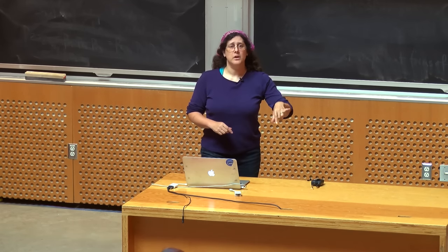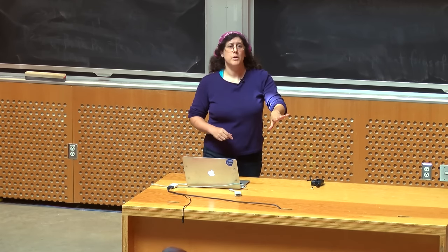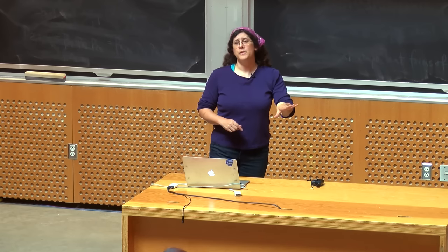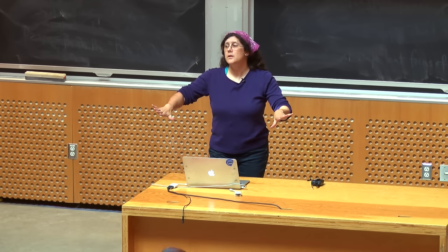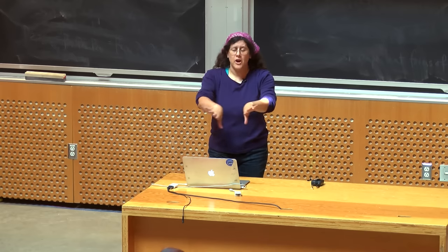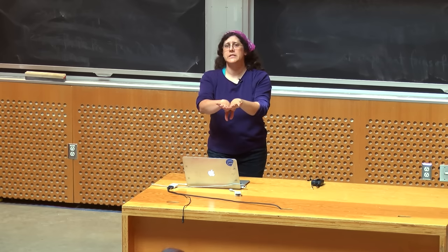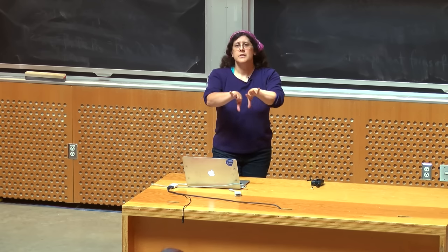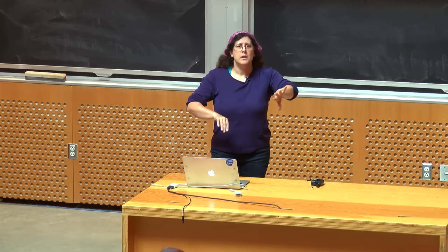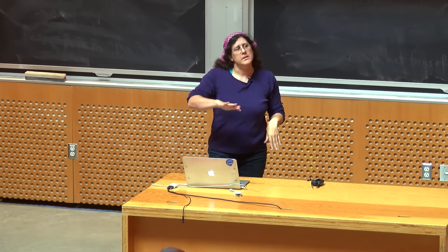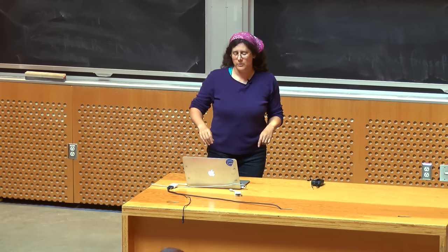Just trying to keep the backlog straight, keeping meetings flowing, and keeping communication flowing is a lot of work for one person. You don't also want to burden that person with being in charge of leading the team and making all the final decisions. If you can find a way to try, they often end up drifting together, and we see it a lot, and we often make the slip of calling the person who's serving as the team Scrum Master the producer. See if you can try to keep those two roles separate. If you can let the Scrum Master just be the person keeping the team running, and you can let someone else step into that kind of vision holder, guide the team role, okay?